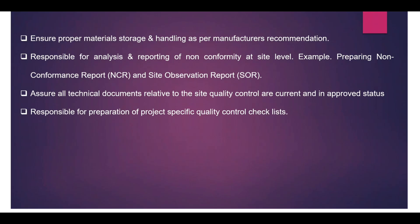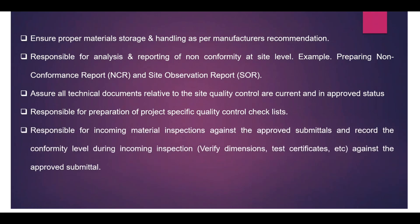You are responsible for the preparation of project quality control checklists — for example, for installation activities, testing, and commissioning. These checklists are normally attached to the method statement, and the site engineer must complete all items. You have to ensure the quality control checklists are properly maintained and followed on site, and are responsible for incoming material inspection against the approved material submittal, recording the conformity level during incoming inspection.